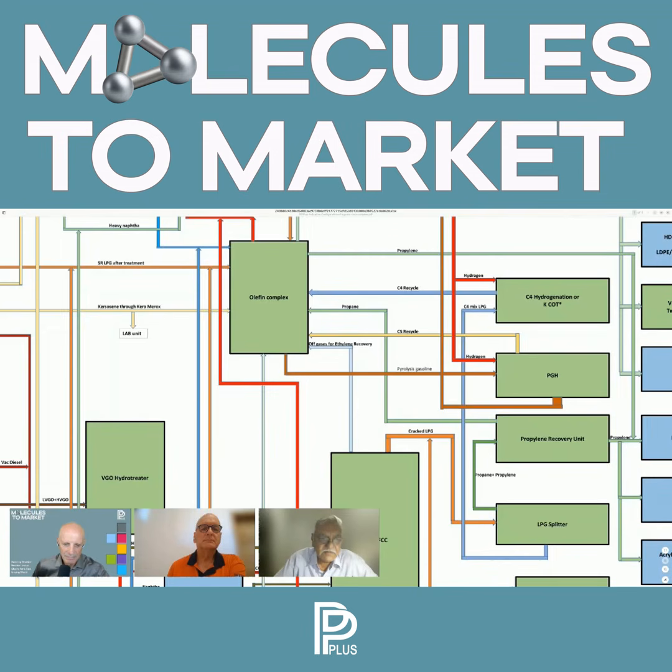One part is that all furnaces which are there in the refinery or the petrol company, they should be engineered. Engineered means thermal design should be completed, API data sheet should be prepared, pass control configuration, etc., should be formed up and reflected in the PNIDs. This is very important because if you don't do that, your PNIDs are incomplete, implementation becomes very difficult. So this is one element.